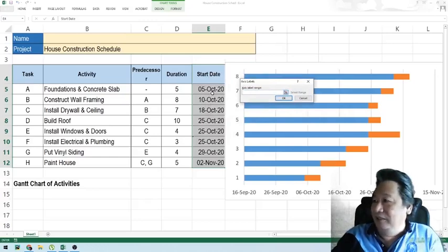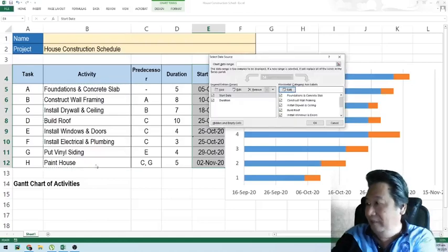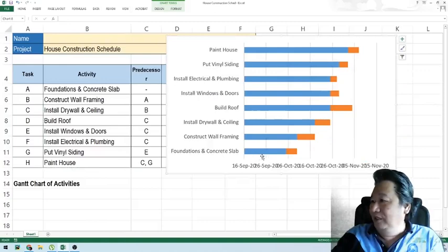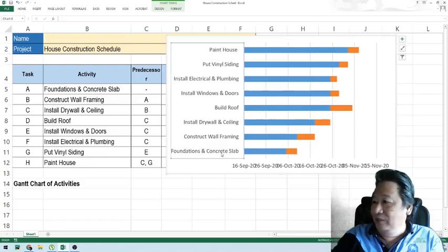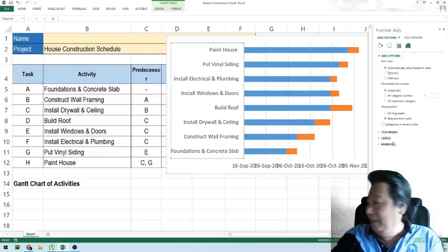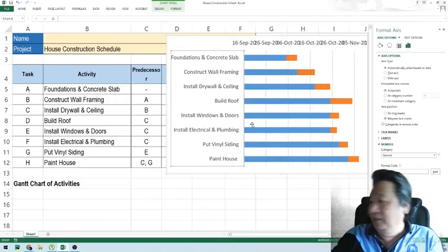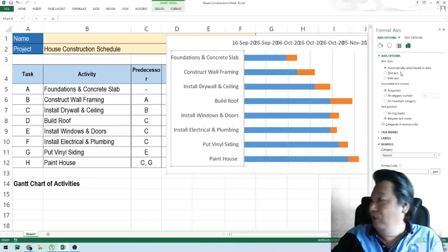While we're here, instead of showing 1, 2, 3, 4, 5, let's get the labels — which are the activity labels. The first activity is the slab, but it's in reverse order, so let's double-click the axis and set the axis position to 'Categories in reverse order.' Now it's in proper order, from foundation to painting.